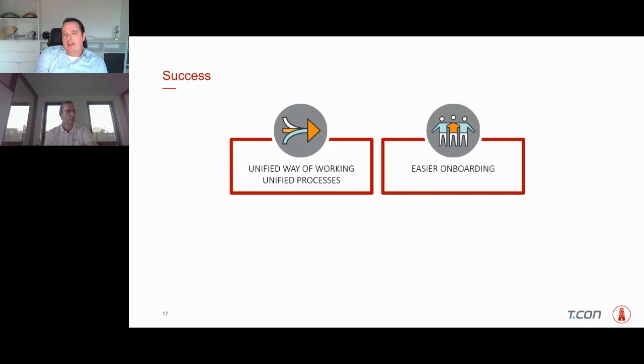The overall timing of Easy North America was that we started officially in April 2021 till we were really up to speed. Let's say it was 1st of May, and we had the go live on 1st of March 2022. That means in the end that bringing over all the processes, changing the systems, adapting the systems, only took about 10 months to bring people on board and to make people able to work in the system.